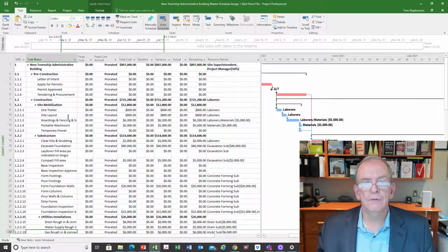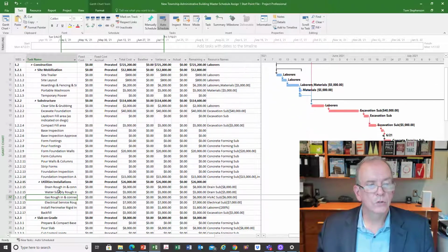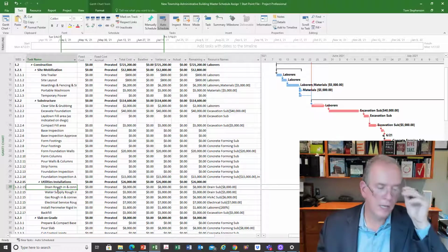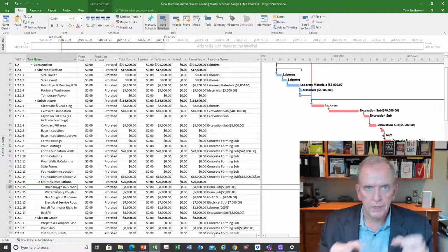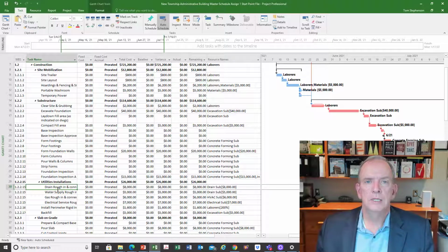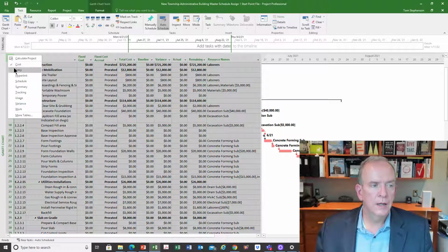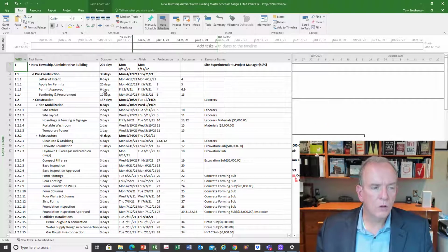And nobody knows everything. So then I can consult with the various subcontractors and pull that information. We talked about communication. I'm pulling and extrapolating that information from these subcontractors, suppliers, etc. And that's helping me to figure out, can I do this at the same time? Can I do these activities concurrently? Do I have to do them sequentially? Then I can start working on things like, how long is this particular activity going to take?